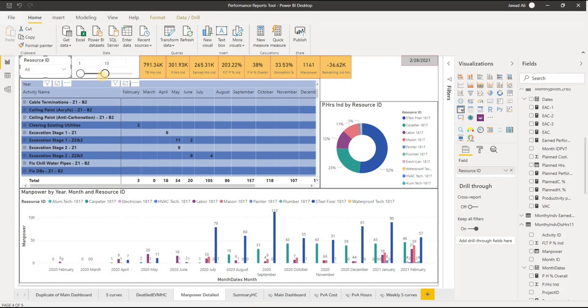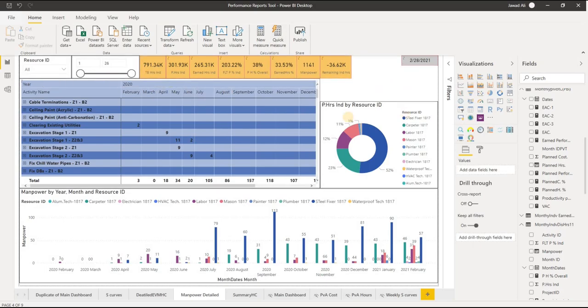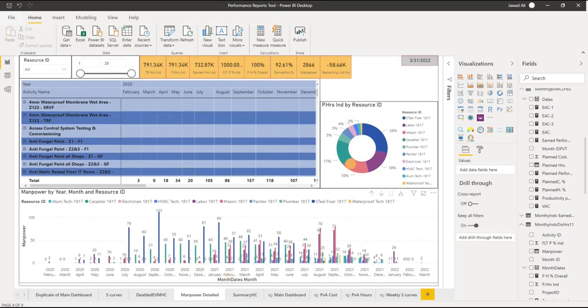This is not only for manpower, it can be for your machinery as well, and all the trades and equipment you have in your company. You can assign them and have a very good interactive report showing where they will be used and in which month and for what duration. Let's say this sheet shows all my manpower for that project over 26 months, which is my duration.